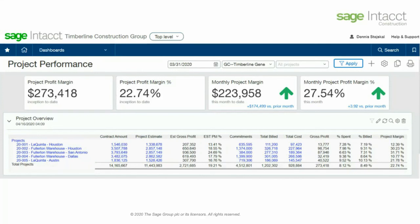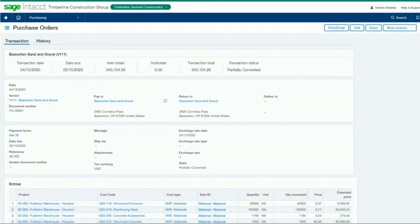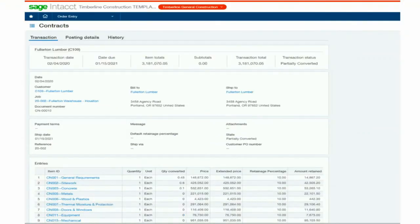Again, notice the blue drill-down areas — this can take you into additional levels of detail, even back to the source entry document. For example, from the commitment column I can drill into a purchase order or a subcontract. Notice how the work breakdown structure of project cost code and cost type is available for the line items. Notice in the middle portion of the screen, multi-currency exchange rate data is also captured. This is an example of a revenue contract containing the schedule of values. From the financial contract, you can drill down and see the schedule of value breakdown and how retainage can be controlled by line item. Screens throughout the Intact Construction Solution now have these construction-required fields dealing with the job work breakdown structure as well as industry fields like retainage.